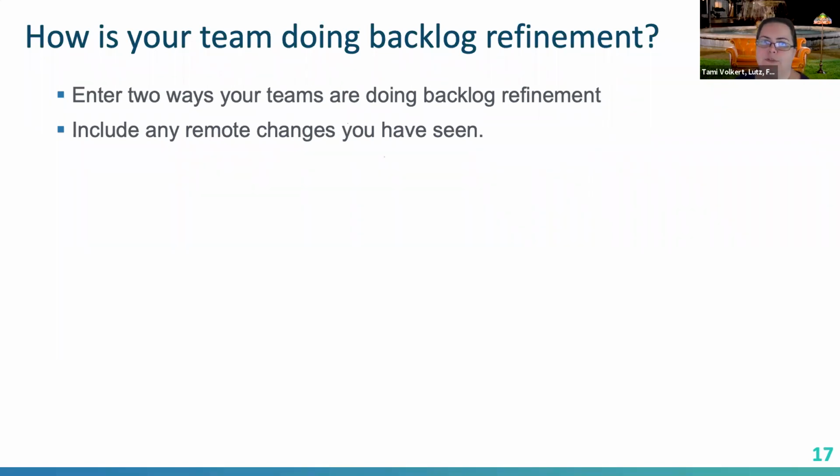They're building out some of those tasks, even though it says you want to wait to add your tasks at the planning session, right? But we still try to get a high level of some of those tasks. It just helps us size the story better and really think about, did we really capture everything? Do we truly understand what needs to be done? And we do that once every week. So it's how we build it up versus doing a 2-hour, 3-hour session once every 2 weeks. It works better for us if we split that time.